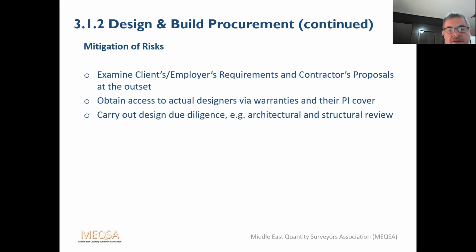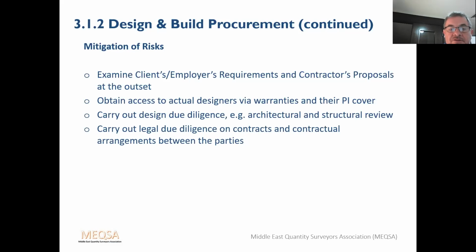You should carry out a design due diligence and architectural structural review. An experienced architect should be appointed by the client to review the design proposed by the contractor. You should carry out legal due diligence on the contracts and contractual arrangement between the parties, with specialist legal advice.